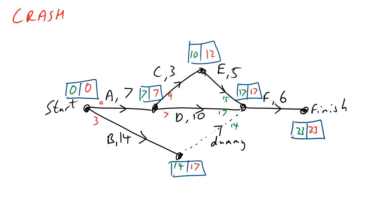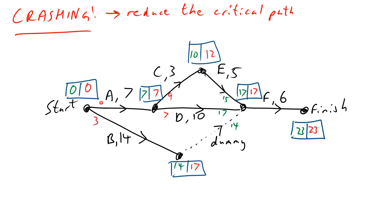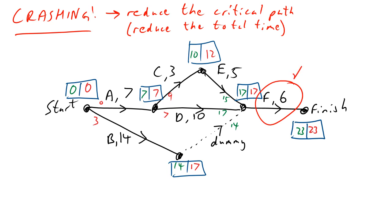Crashing — this is where people normally crash on the exams, but all we're trying to do is reduce the critical path, which means reducing the total project time. We need to make sure we get a bang for our buck — we don't want to reduce things indiscriminately because that can have effects. For example, any change to F is good: F is on all paths, so there's no way to reach the finish without passing through F — any reduction in F reduces the whole project.